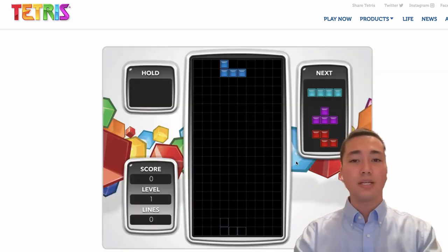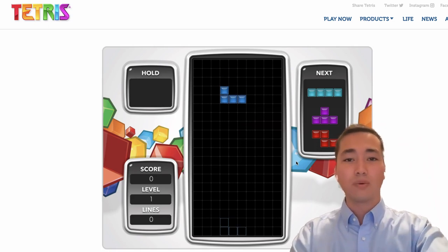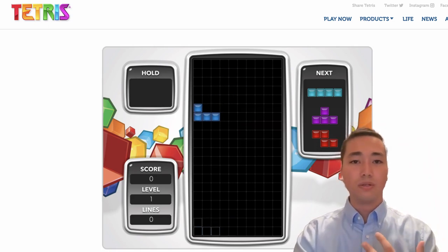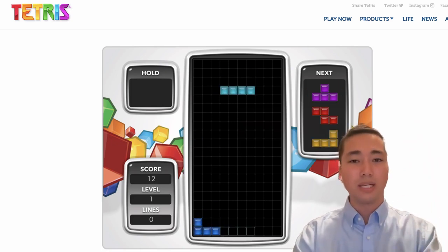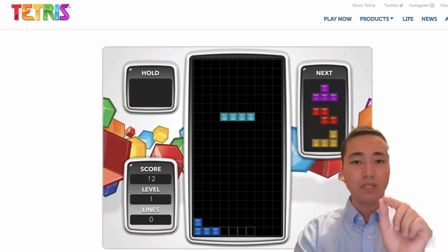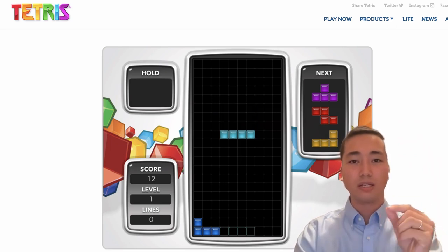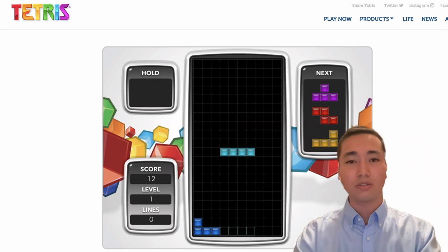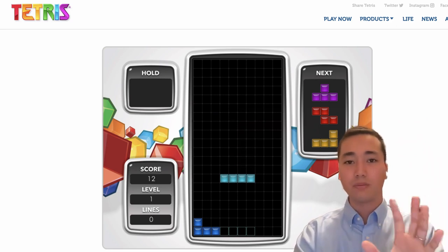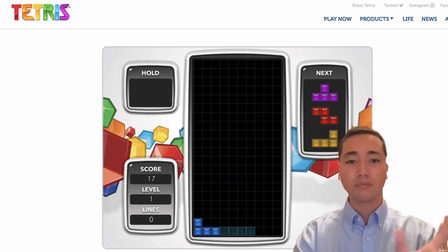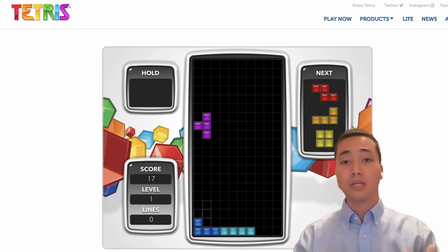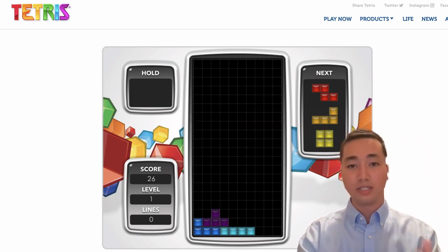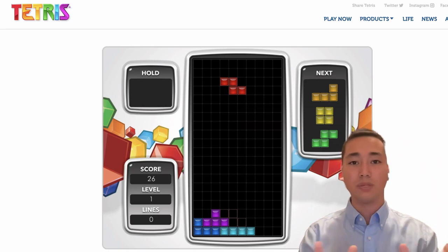So I've been thinking about, how do I understand what the priority is when it comes to what goes into our backlog? Now, I will admit I'm not very good at Tetris, but the idea came to me that each one of these squares could be thought of as a user story. And when you're looking at a user story within a sprint, you try to do a certain amount of user stories within a sprint, which can be captured in what's called story points. Now, in terms of story points, this is what you work together with your team to understand what is the capacity of your engineering team and how many story points you can complete at a time.